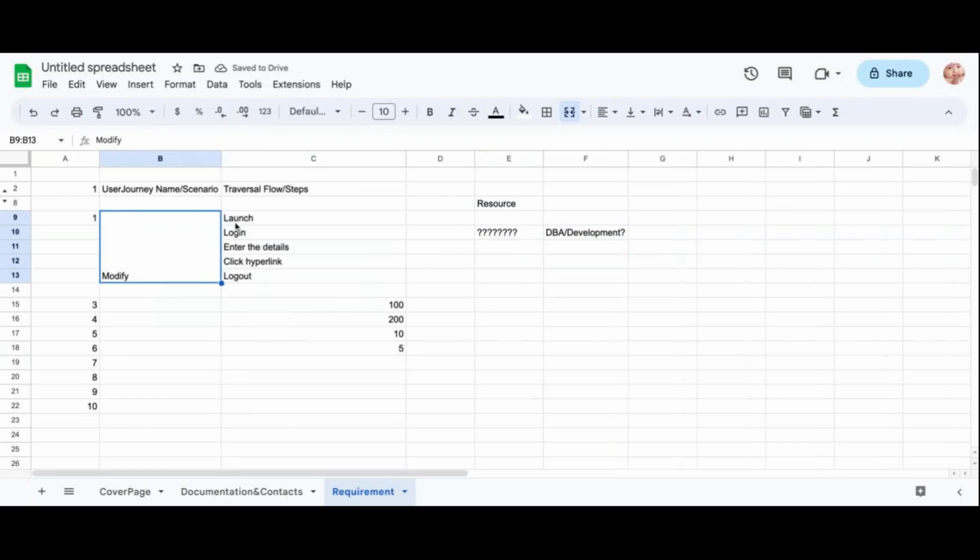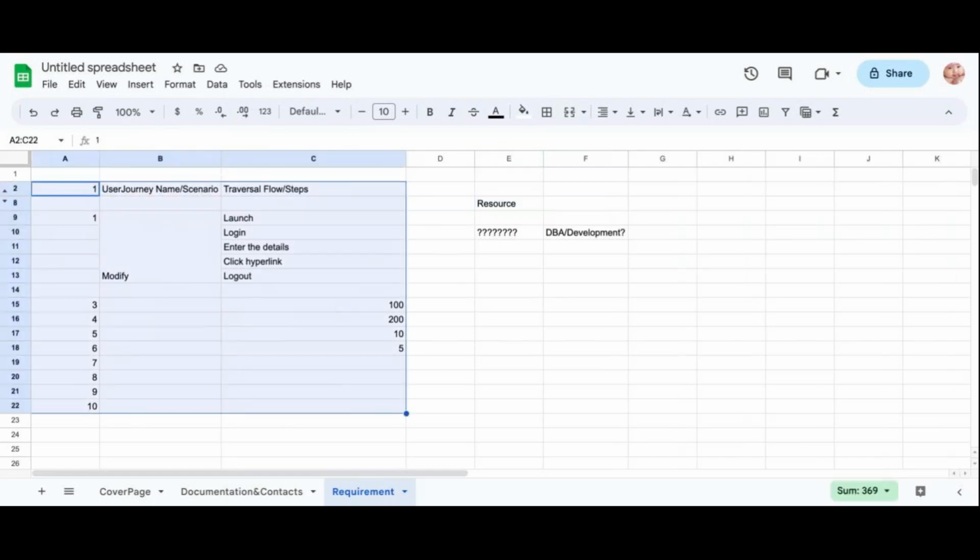The tester. Once you get the NFR, ask for some time to understand the NFR document. After filling in the information, go through the flow and understand it. Whatever information you need, ask who is going to provide it. If we are going to do the flow, it needs additional effort, right? So based on go live, resource, and deadline date, act accordingly. This is very, very important in choosing the scenario. Don't agree to all the scenarios.